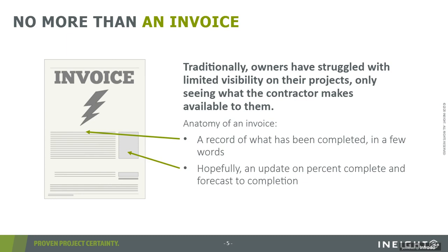Hopefully there's some sort of update on the percent complete of those items, and a forecast to completion, what's left to do, right? But more than anything, every one of those invoices is going to come with what we owe, what the contractor is looking to get from us for this particular project. And that level of information is good.